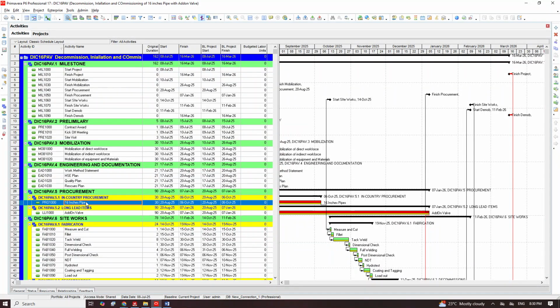Under procurement, you just discuss with the procurement team, and anything the procurement team is giving you, please put buffer. If they tell you this item will be available in 2 weeks, please add an additional 1 week, right? If they tell you it will be available in 6 months, please add an additional 1 month. Please make sure you put enough buffer in procurement. This is one area we normally have issues.